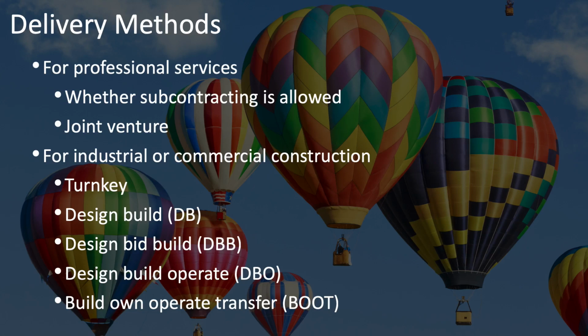The next delivery method is design, bid, build. This is a little bit different, and not quite what it might appear to be, because in this case, the buyer will hire an architect or an engineer that leads the design. This lead architect or engineer usually hires or engages other engineers in civil, structural, mechanical, electrical, plumbing, safety, or environmental engineering. But you have just this one lead architect or engineer in charge of it all. Then this design that they come up with goes out to bid. And then usually that bid is awarded to a general contractor who has lots of subcontractors working for them.